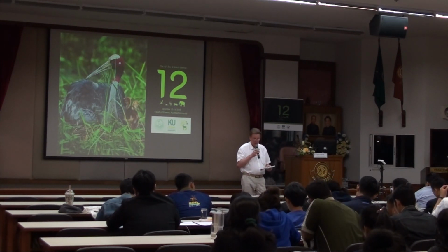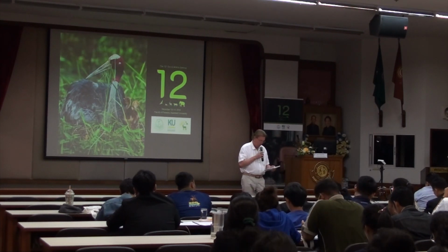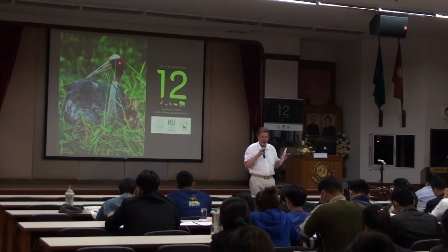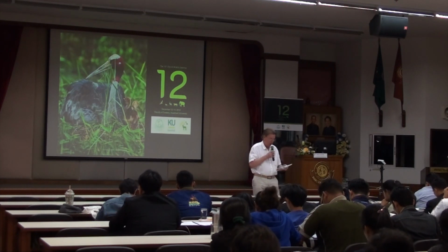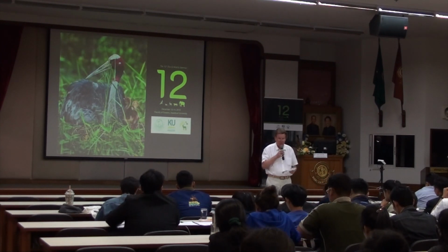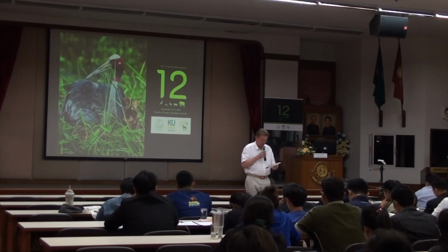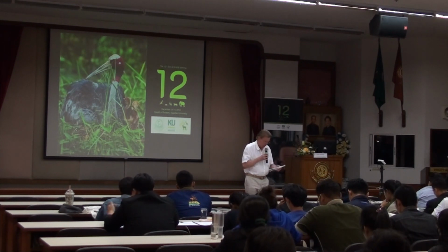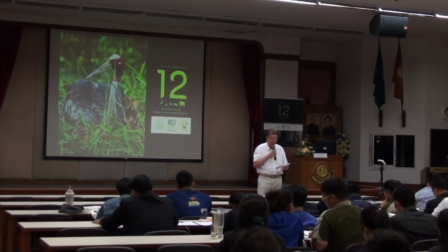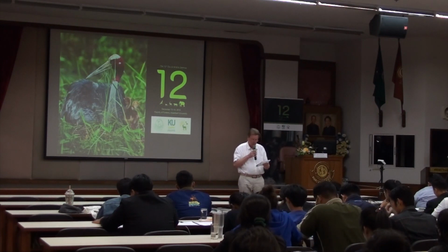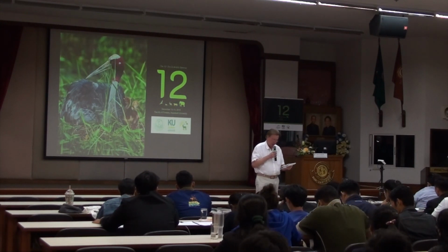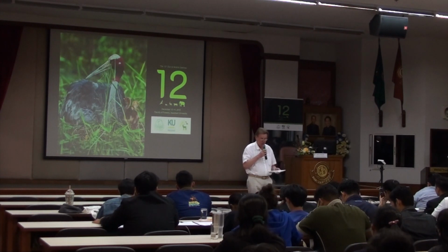When building a zoo or new exhibits or working with contractors, don't let contractors avoid providing the facility what we call as-built drawings. In other words, do insist on as-built digitalized drawings that can be on record for the zoo. And then finally, in facilities, don't exclude commissioning on all mechanical, electrical, plumbing, and HVAC systems. Do insist on commissioning and client training on the operations of these new systems.